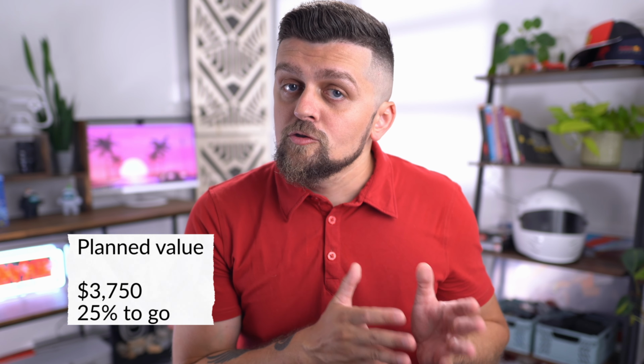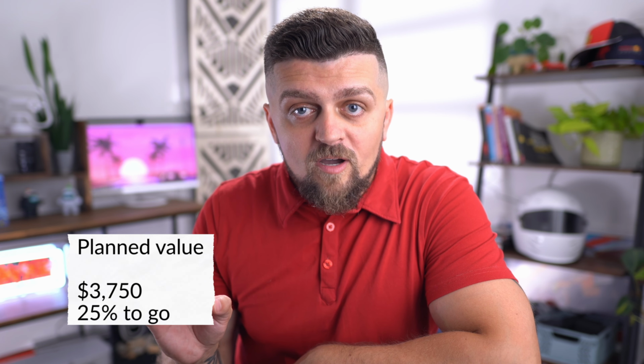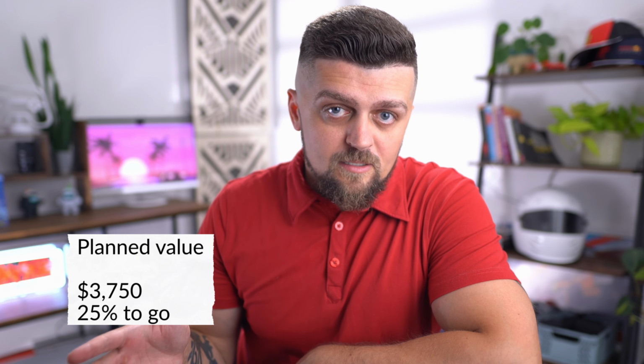For example, say I am 50% done with a project worth $5,000 at completion. If I want to know what the value of this project would be at 75% completion, I multiply $5,000 by 0.75 to get $3,750. In other words, my planned value should be $3,750 with 25% more work to be completed.